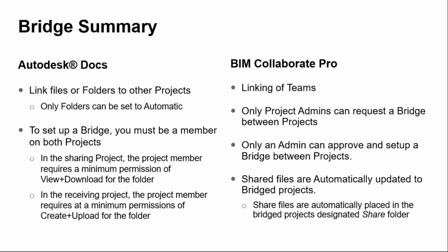So in summary, both Docs and Design Collaboration bridge projects can be viewed and managed within the Bridge tool, regardless of the selected module. When bridging Revit projects, all projects need to be on the same version and version 2023.1 or later. Bridging in Docs can be used for Revit files as well if the share and consume workflows are not currently being used. In this case, the shared Revit files will update when a new version of Revit is published.